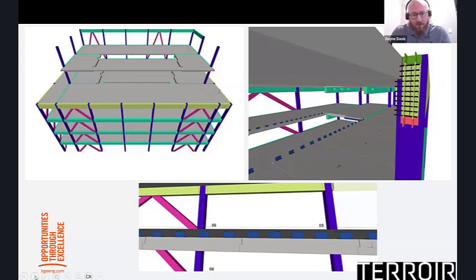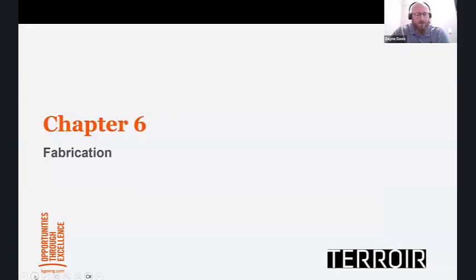It gave the builder ultimate flexibility of procurement. They were more procuring like a shopping list, not necessarily locked into different producers so early in the piece. It was only the last few weeks where they did the final tenders that we were able to get the final quotes and pick the final selection of producers. So we stayed as independent for as long as possible.